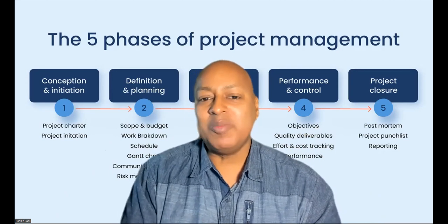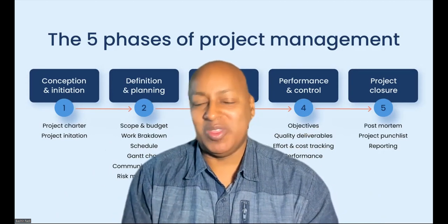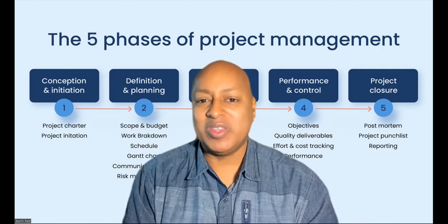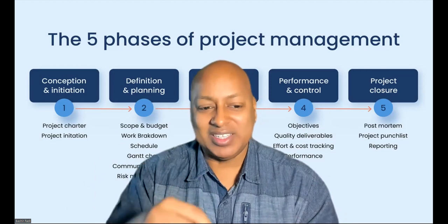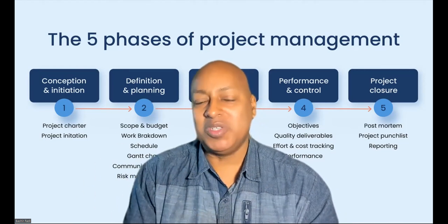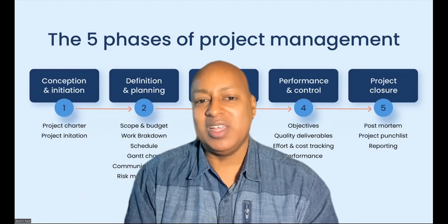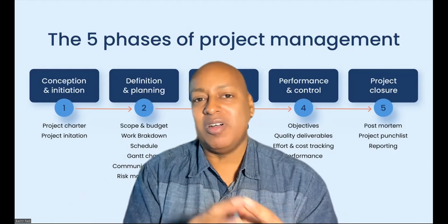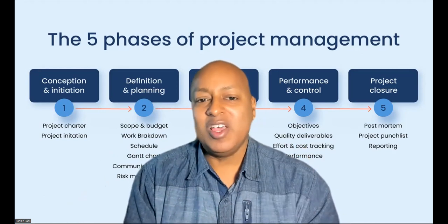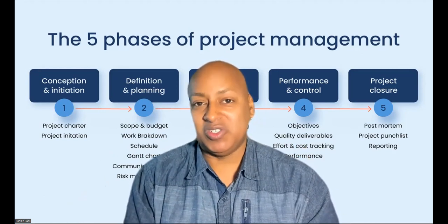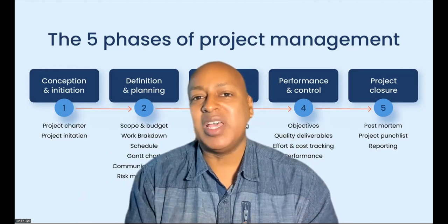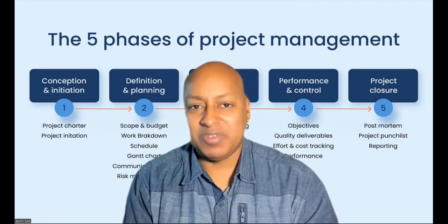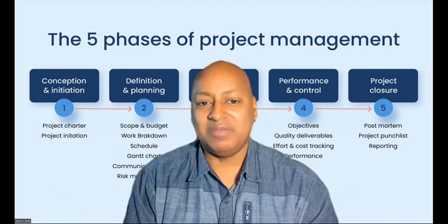Number 2, we establish reporting protocols and procedures, whether it's a dashboard on Microsoft Project or Jira, for instance, or an Excel sheet where we're tracking things. Whatever platform, form of communication, or project management tool that we're using, we want to establish reporting protocols and procedures. Number 3, we want to install change management procedures. Usually this is very valuable to let us know as things are changing and being delivered, so that we have a nice way of communicating that is efficient and effective.